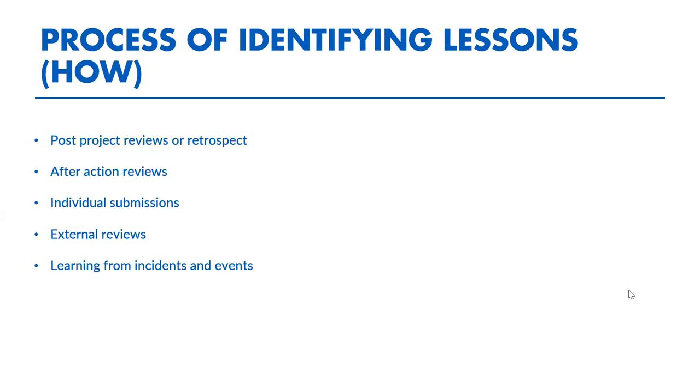Now, because this is a post-project review, you can't go back and course correct, and therefore the purpose is to come up with recommendations and advice for all those who are going to be working in similar environments or in a similar sector or targeting similar problems. So, for example, I work within the Disaster and Emergencies Preparedness Program. One of the lessons that we have identified is that collaboration, which is one of the pillars of this program, actually takes time. And therefore, the recommendation is that we need to factor in more time. We need to give the projects more time at the inception phase. So there needs to be an inception phase built into the program before project implementation starts. Now, because there wasn't an inception phase built in, a lot of the projects had to spend a lot of time forming these collaborations.